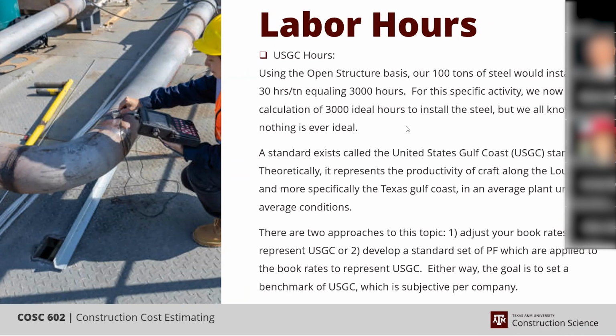Now, depending upon what the average is, we would then add anywhere from 4 to 12% for connections. But one thing to remember is your connections primarily consist of medium weight steel. So if you had 100 tons and it was medium steel, with connection weights probably around 8%, you'd have 8 tons of connection steel.